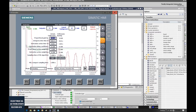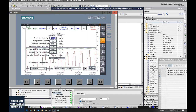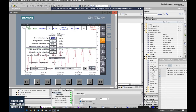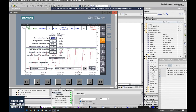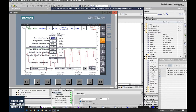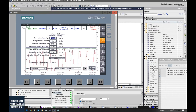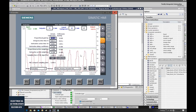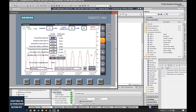As we can see, when the gain is working at 140, the output under automatic control gets an oscillation, but the amplitude is becoming higher and higher. So I reduce it to 130. After changing to 130, we can see it is ramping down. That means this KCR value could be around 130 to 135. After running for a while, when the gain is set to 130, the amplitude on the output stays the same. So this KCR could be 130.